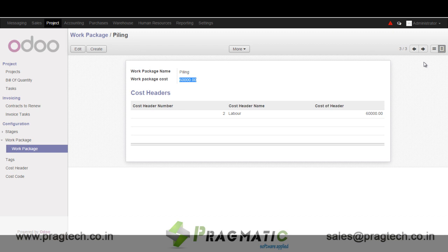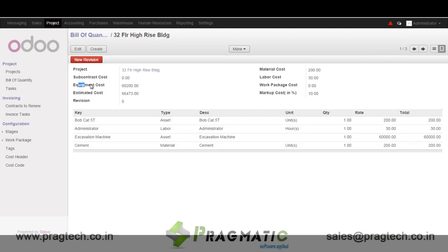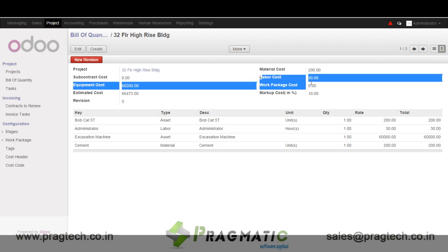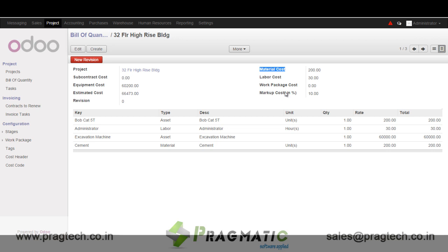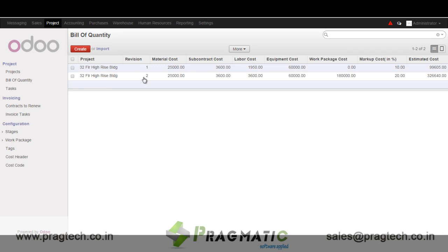Now let's go back and see if the BOQ selection has given the total cost and the tolerance needed. We can see the estimated total cost, the work package cost, labor cost, and material cost — a full breakdown of price. We also have the option to revise a BOQ based on negotiations or rework. When we click 'new revision,' it gets revised and we can make the required changes. We now have version two as the latest version to work from.